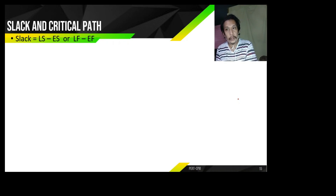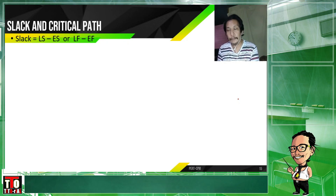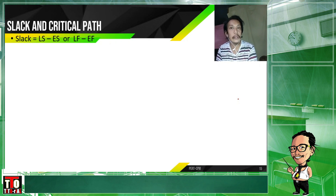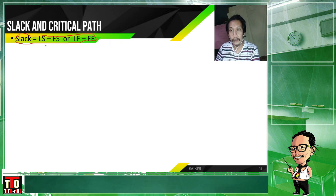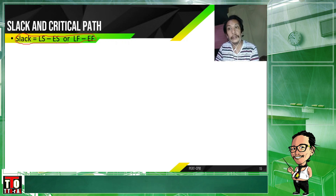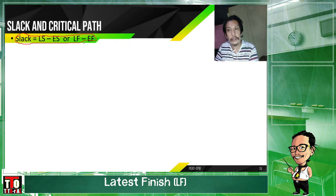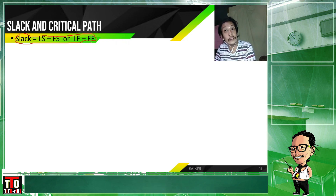So, after the forward and backward pass, the next thing that we are going to do — the next step — is to determine the slack values and the critical path. The formula for our slack is: LS (latest start) minus ES (earliest start), or LF (latest finish) minus EF (earliest finish).